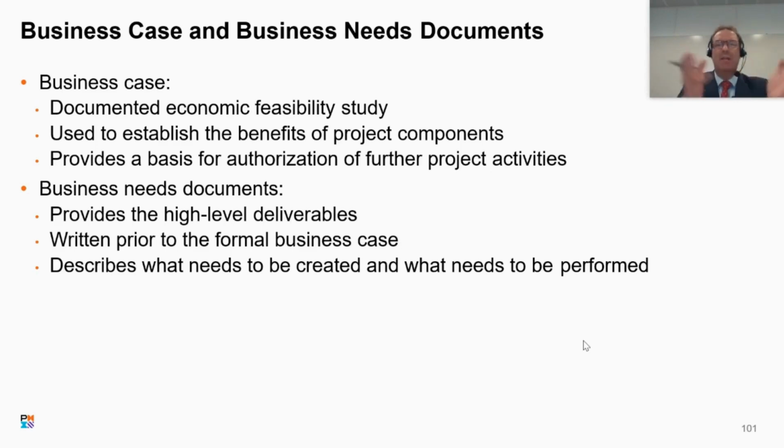And the business case can evolve through lots of different scenarios to become a fully fledged, fully functional business case. But crucially, it is the document that understands and helps to relate back to that justification. Why are we doing this? And at each touch point throughout the life cycle of your project, we can review that business case to determine if that justification still exists.